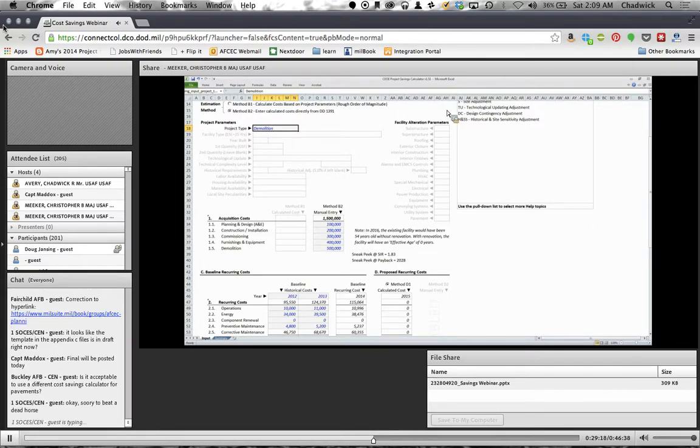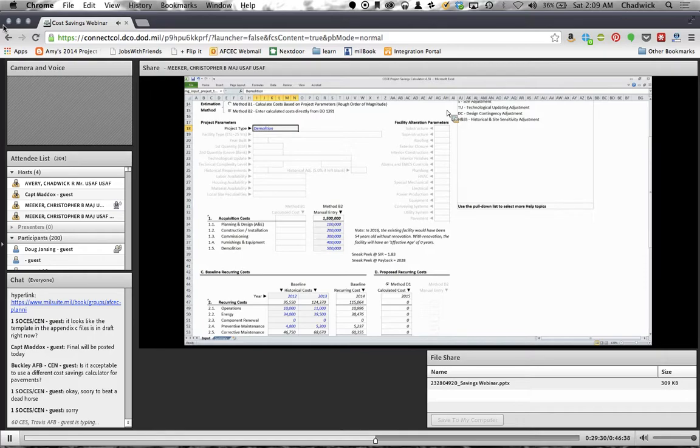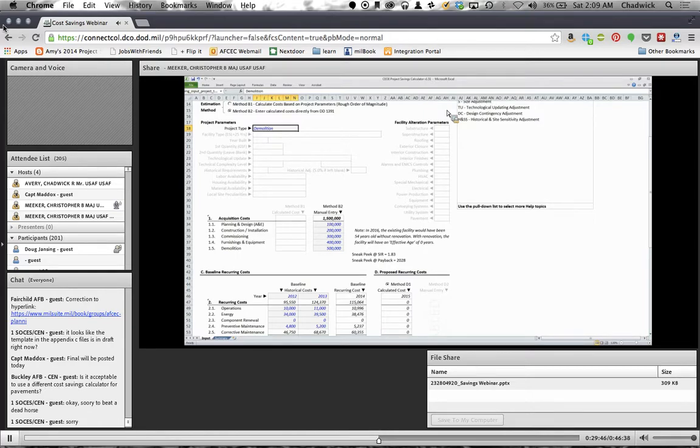In the IPL process, how are we distinguishing risk-based projects from savings-only projects? The short answer is that every single project, if it's going to show up on the IPL, will require a COF score and a POF score. That is one area we're pulling to make sure that you have that. So every project is going to have a risk component to it.